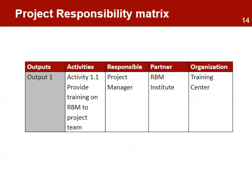The responsibility matrix lists all the people, including partners and other actors who have a responsibility to complete an activity or a task. All tasks and activities identified in the WBS should have an owner. The matrix can be expanded to include people that will provide support to the person or group responsible for the project work.